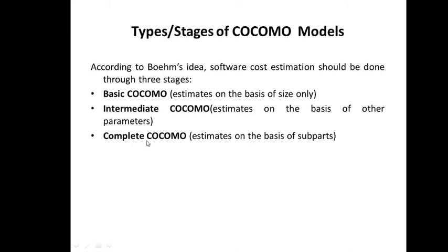Then what is the complete Cocomo model? Both basic Cocomo as well as intermediate Cocomo model assume that the project belongs to either the organic category, the semi-detached category, or the embedded category. The complexity ratio is 1 to 3 to 9. Application software is 3 times less complex than the utility software, while utility software is 3 times less complex than the system software.